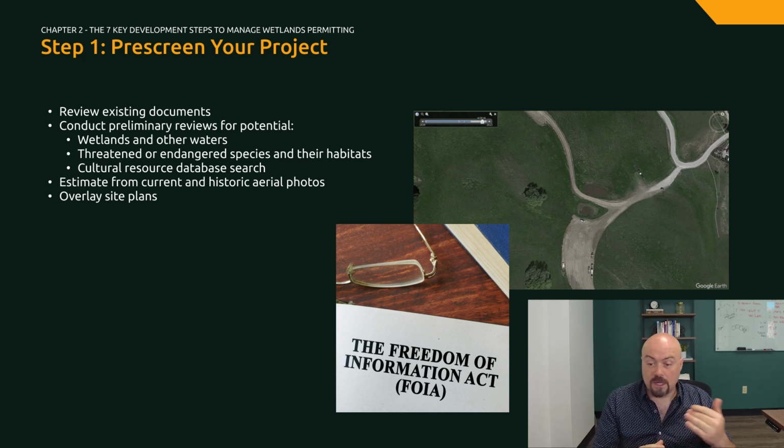Historic imagery is also helpful in looking for hydrology patterns on your property where water is flowing or standing over time as more or less rain is available. Agencies are very careful about not discounting wetlands and other waters just because they dried up for a year or two. So there has to be clear evidence that these features are not on your property. Another indication of water is vegetation. So if we see more heavily vegetated areas on an aerial, it can indicate that there is water present.